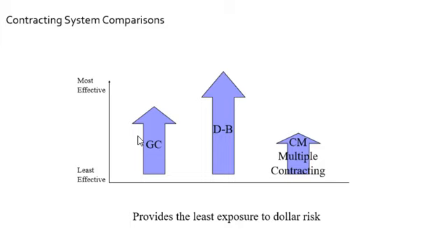There could be items missing which produce change orders. And if that's the case, the owner would be responsible for paying for those misses. All right? The architect is responsible for the mistake or the omission, but the owner would end up picking up the bill for them, essentially. Yes, so we'll leave it at that.